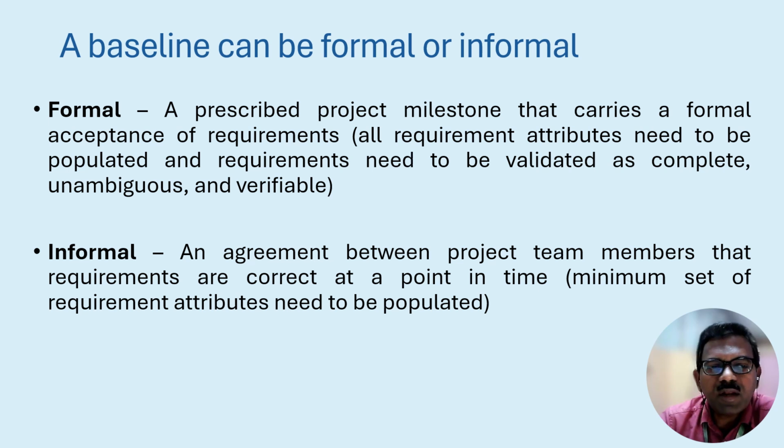A baseline can be formal or informal. Formal is when you describe the project milestone that carries a formal acceptance of the requirements. So formal is something which is well documented, well discussed from the top level to the developer level, whereas informal is something which is within the project team, within the developers or the project managers.